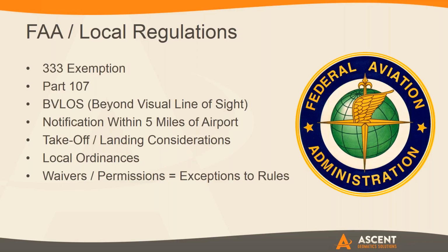And then you also have to make sure that you have airspace considerations, because there's certain airspace that you cannot fly within. There's certain airspace that you can fly within, but it's going to take waivers and authorizations that you have to do and account for time on. That's one of the key factors in determining, can we use the technology for a certain area, and so we'll dive into more of what we do in those situations when we can't necessarily. And otherwise, we always have to take into account the local ordinances, because there's a lot of people that just don't want you having a swarm of drones flying around in a city park.